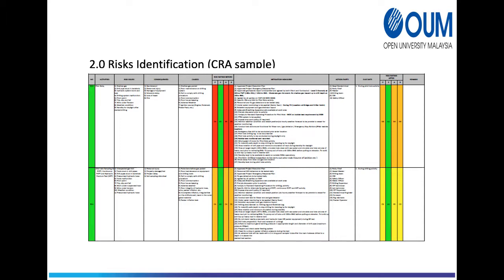The risk rating is a combination of the risk likelihood and the risk impact on the overall project and is determined by using the client risk assessment matrix. Based on the CRA, shallow gas was identified as very high risk.